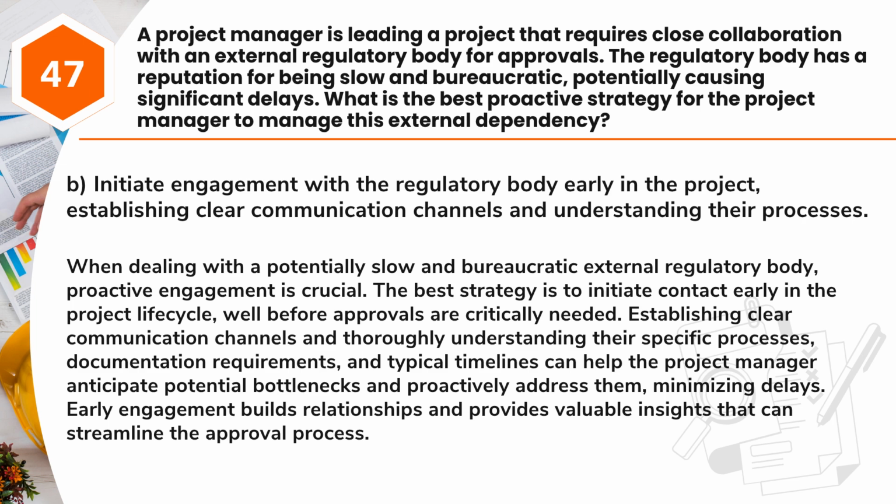When dealing with a potentially slow and bureaucratic external regulatory body, proactive engagement is crucial. The best strategy is to initiate contact early in the project lifecycle, well before approvals are critically needed. Establishing clear communication channels and thoroughly understanding their specific processes, documentation requirements, and typical timelines can help the project manager anticipate potential bottlenecks and proactively address them, minimizing delays. Early engagement builds relationships and provides valuable insights that can streamline the approval process.